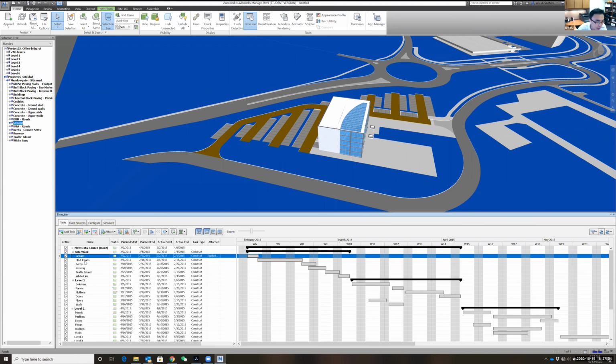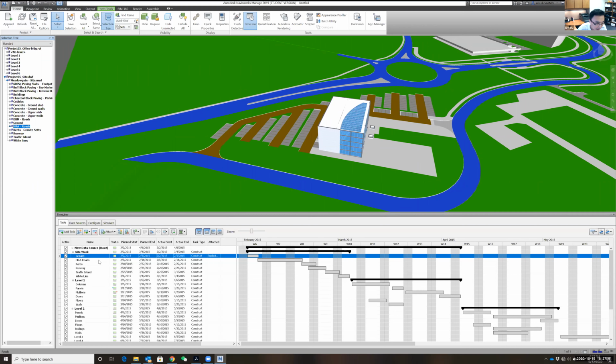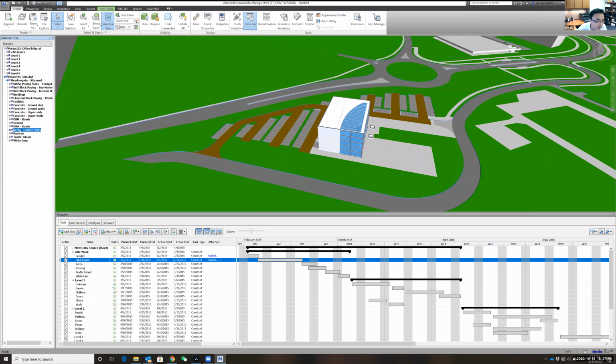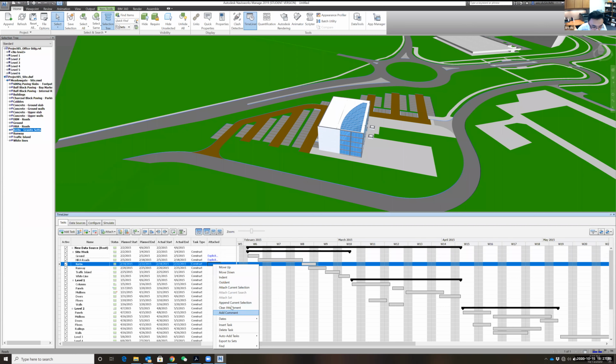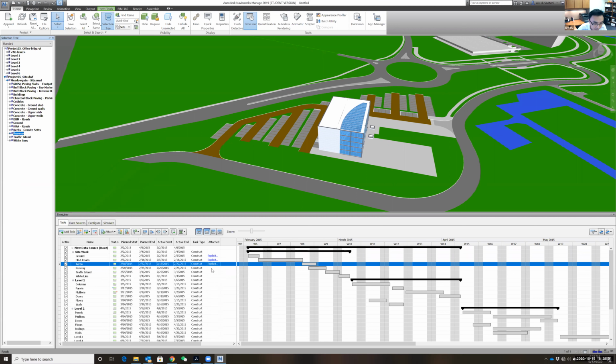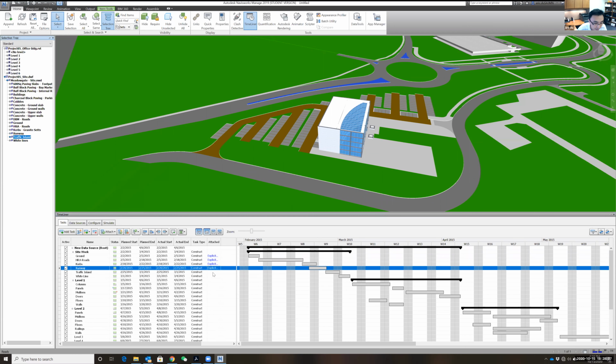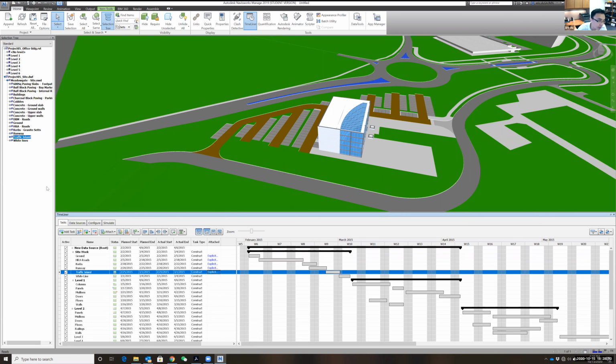I'm just going to do the same thing for the HRA roles, finding them and making sure this is something I would like to link. I find the activity here and right click, and I do either attach or append. That's it. Same thing, curves. Make sure they look correct, and come in here and just say attach. Runway. Let me find my runway and come here and say attach. Traffic island. Come here, just say attach. So now you can see it's easier than Synchro in terms of doing this linking, okay?